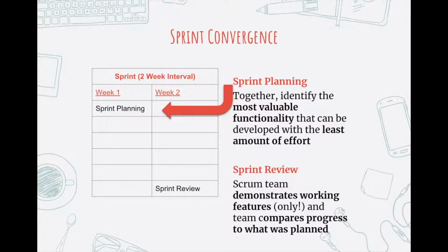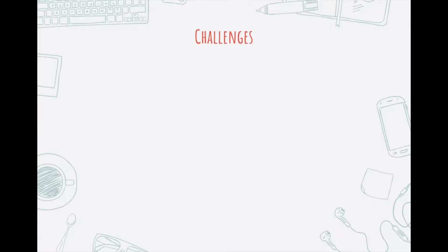And so at the very beginning of each sprint, we'll start off with a planning session, including everybody. The different roles within that time period will diverge, where individuals work on their personal responsibilities and their part of the team's responsibilities, but then converge again for the review to see what was actually accomplished, what new things were found, and how the team can adapt as necessary.